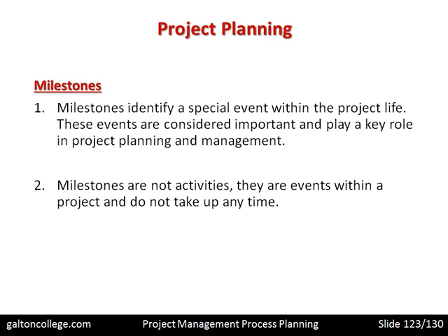Milestones are not activities. They are events within a project and do not take up any time. So they are really indicators of the completion of some phase of the project. The milestone is when something is done so that there is a changeover from one line of activity to the next. In other words, that old line of activity is now done, it's completed, so it's important now to switch over onto the next activity and move on. But the milestones are not activities. They are just, in a sense, the indicators. The milestone events are indicators that one has come to an end and a new one is starting.